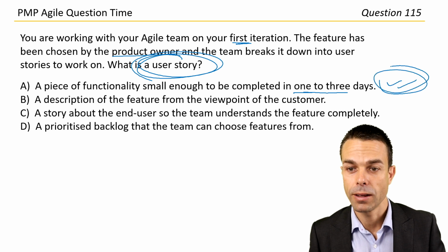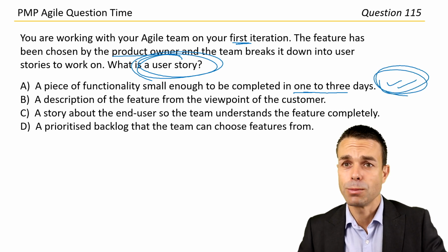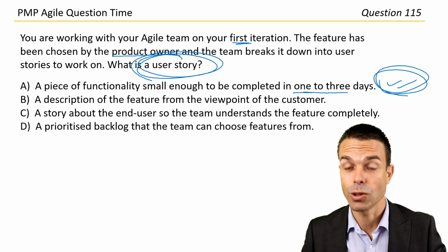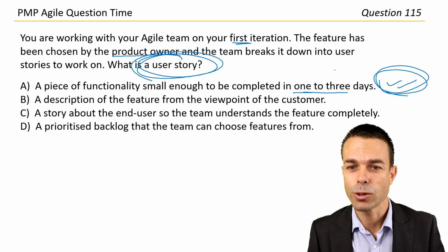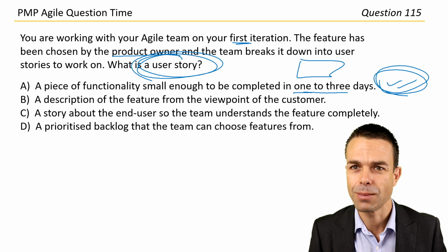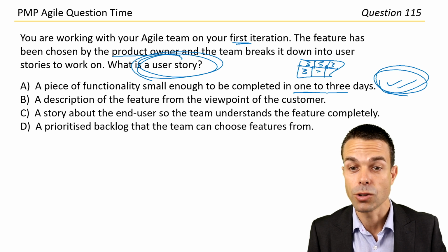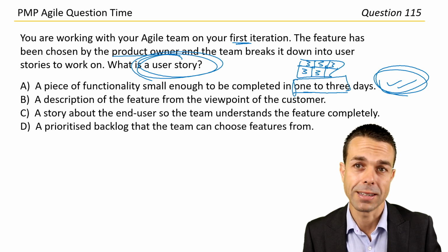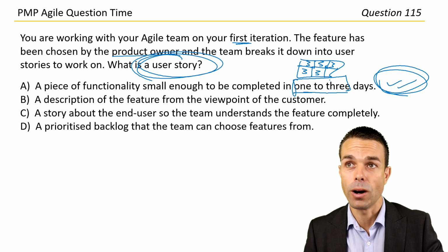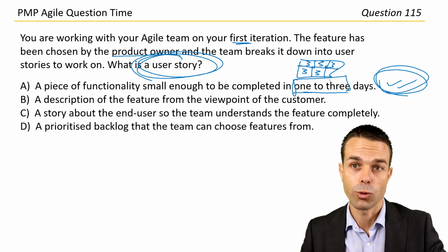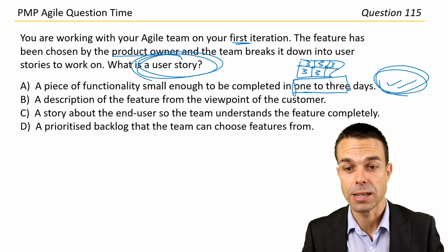Definitely that one. And sometimes we get user stories that are big. So it might be 20 days, so it's a big piece of work. Can we break that into smaller cards and then assign them smaller values so that we can complete it in 1 to 3 days? That's the power of small increments of work, and then those will feed up into the feature.